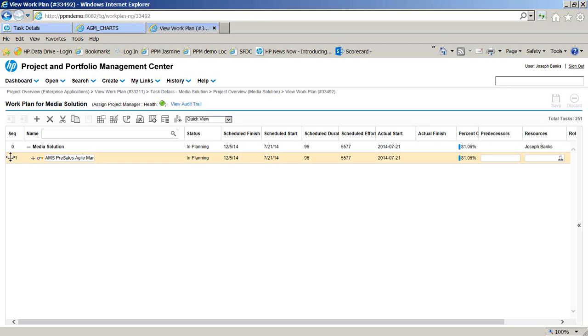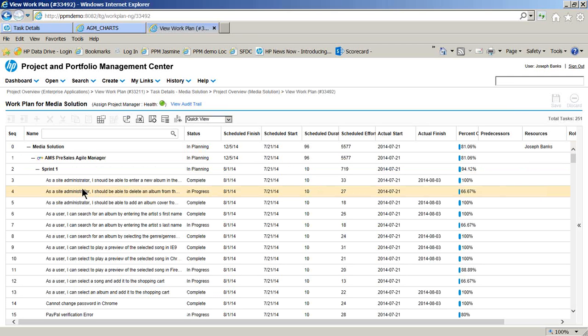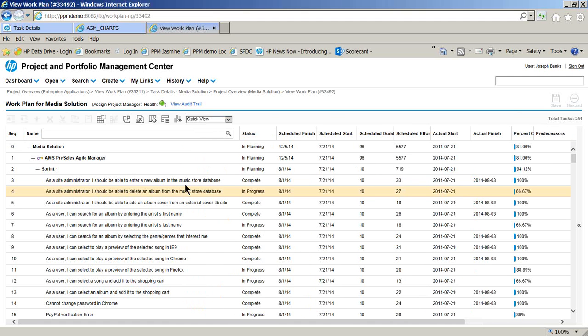What you get when you connect those entities from Agile Manager is actually it imports the release hierarchy and, from each of those stories, a task, and that task information, as you can see here, is coming right out of Agile Manager. So we actually get a really comprehensive view not only of the things that are going on. So I haven't done any entry necessarily in our PPM tool. I'm simply harvesting that information and it's replicating into this location.